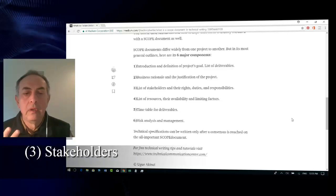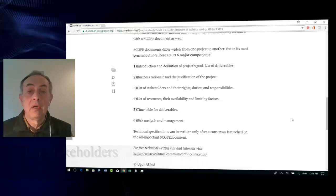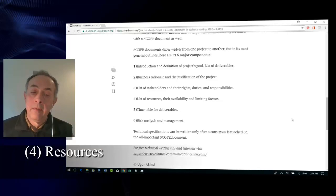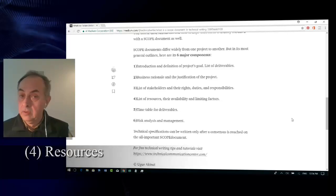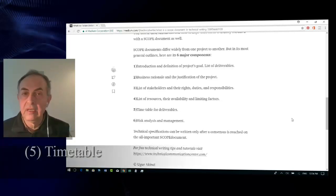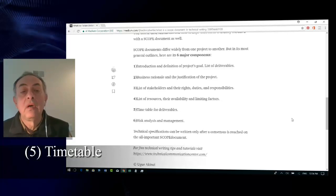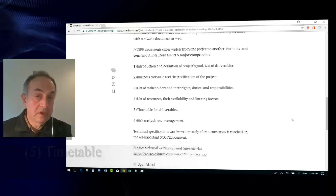Fourth, a list of resources — how available they are and what are the limiting factors on those resources. Fifth, a timetable for deliverables; you really need to have a very clear idea about the calendar involved. And sixth, risk analysis and risk management, as we mentioned.